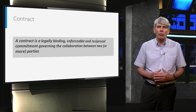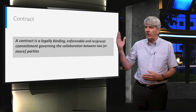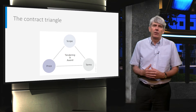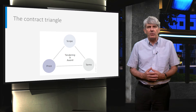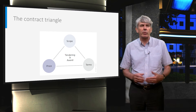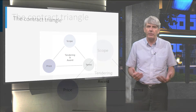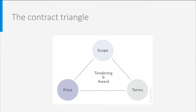Essential elements of contract formation are indicated in the figure. The concept of offer and acceptance is at first sight simple and straightforward; in practice however, complications arise on a regular basis. A statement can only be qualified as an offer if it defines the following main elements: the scope of work, price and payment provisions, and terms and conditions.